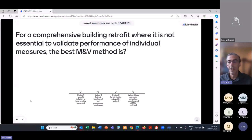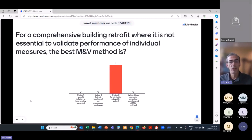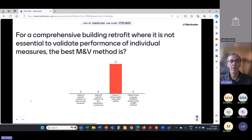For a comprehensive building retrofit where it's not essential to validate performance of individual measures, what's the best method? Option A or B, retrofit isolation; Option C, whole facility; or Option D, computer simulation? Seventeen people got it correct — you could use whole facility, Option C. However, if funding from ISO requires reporting M&V savings for each individual measure, then Option C is out because you won't be able to disaggregate and separate the savings of individual measures.